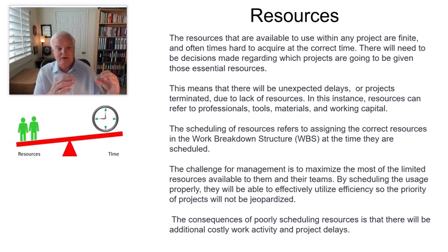So if you look at the WBS and you say, these are the people that are going to work here, that's the way we resource load into that. We create resource loaded schedules. That gives us the ability to really understand how many hours we're going to need, by who, and if we've got any problems that may come up.